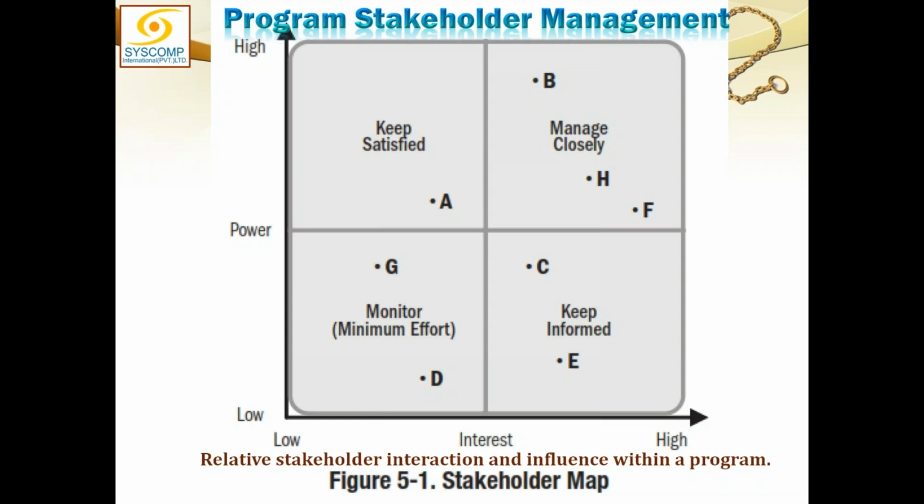In the exuberance of dealing with a key stakeholder, the program manager thought that this stakeholder would be interested in everything. He is not. So keep him satisfied. What does a banker want? He just wants a quarterly report on loan repayment, and that's about it. He is not bothered what you are doing in your project. Who got sick?